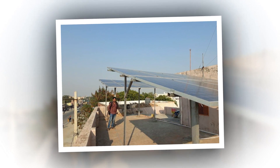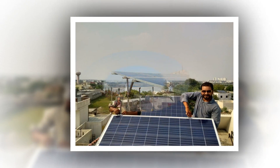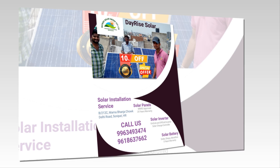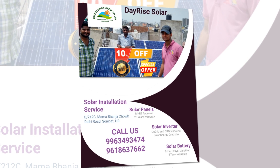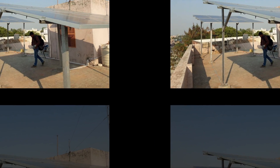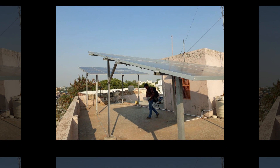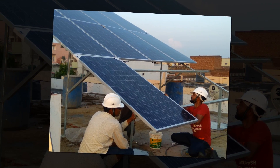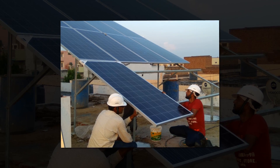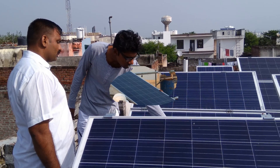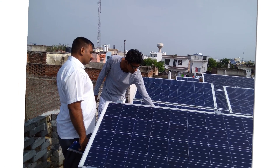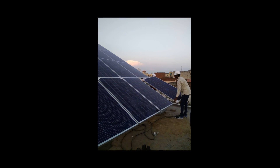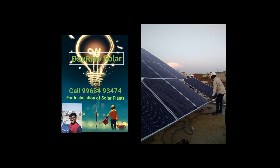Step 8: You will be responsible for payment of 100% of the system cost. If you choose to finance your solar plant, you may work with your bank to procure financing of 70% of the system cost. All nationalized banks are required to provide loans for installation of grid connected rooftop solar under the home loan category. Step 9: The CPO, PO, APO and SNA inspect your installation to ensure that only MNRE approved components are installed, and issue a provisional commissioning report. Step 10: 30% subsidy of the benchmark cost is released directly to the beneficiary's bank account without waiting for installation of net metering or any other process.